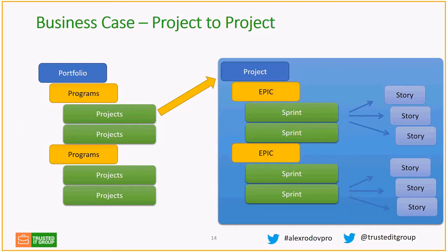These two are linked like this, and then you'll be able to report and aggregate information about agile attributes: how many sprints, how many stories within this sprint completed versus in progress. You can pull the report in the project, pull some actuals, some financials, to get an overall, comprehensive, holistic view of your project by looking at waterfall-type information and agile-type information.